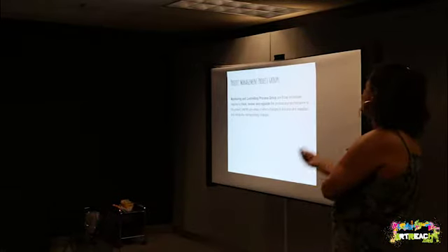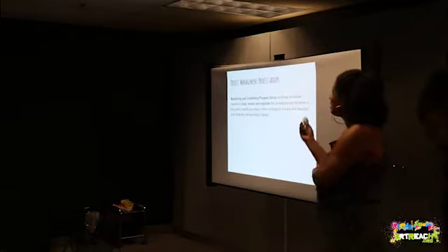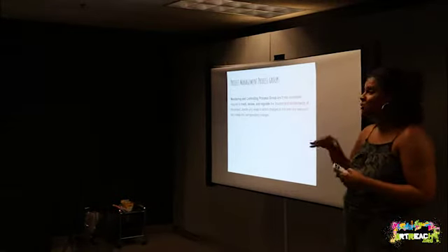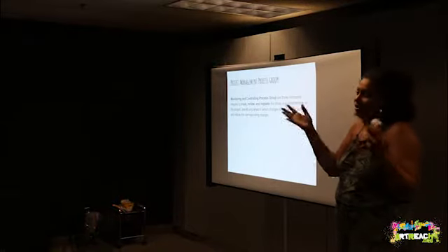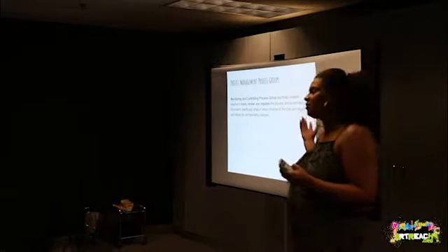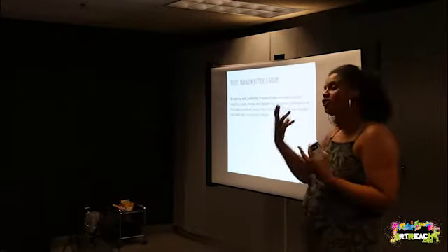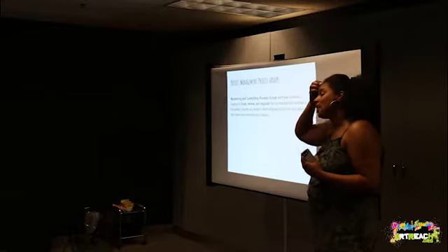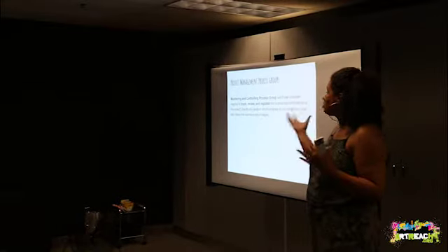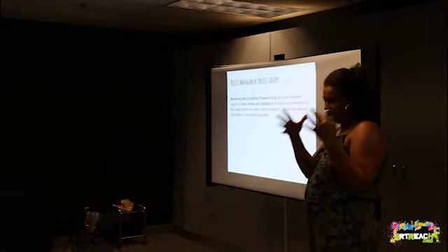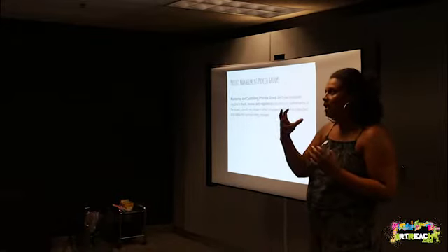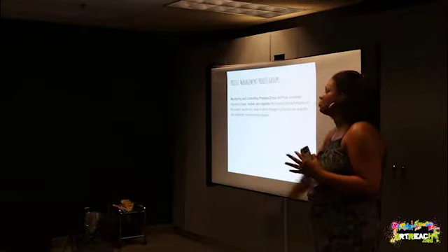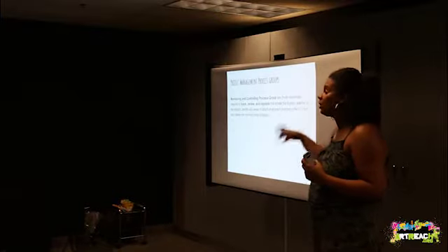Actually, I do have something. In this section also, if something in your project's not working, this is the time to change it. Don't just say, we'll go along with this, and then at the end say, well, this didn't work. There are opportunities in your project, depending on the length, to make changes. But when you do make a change, you'll see it says track, review, and regulate. You have to track those changes, and if you do project management in depth, there's usually a regulation process that authorizes, tracks, and approves that change before you can actually change your project, right?